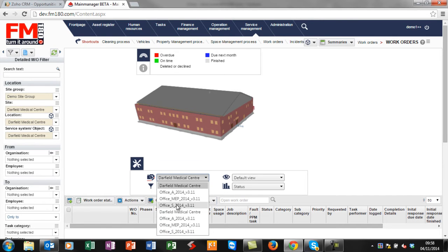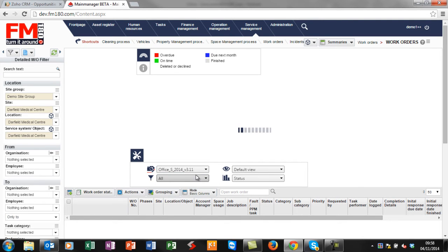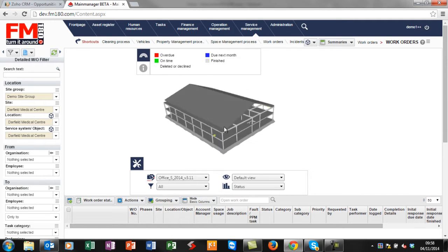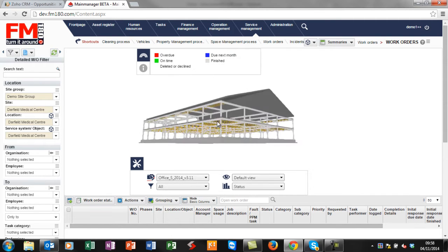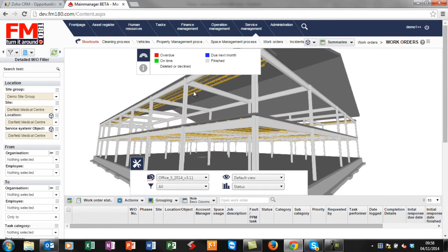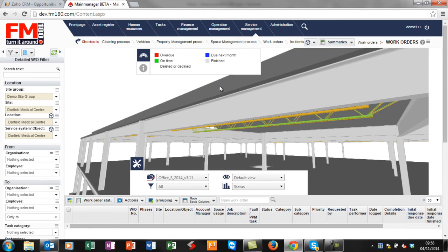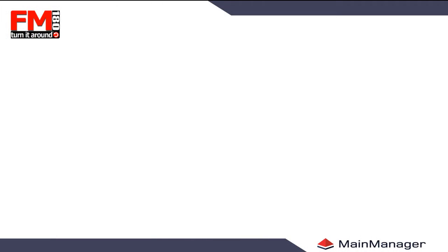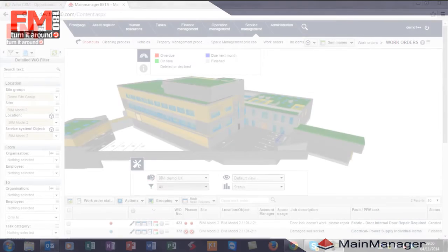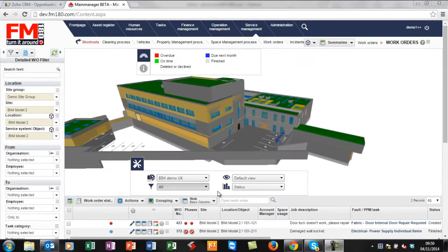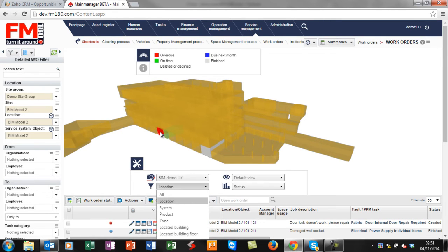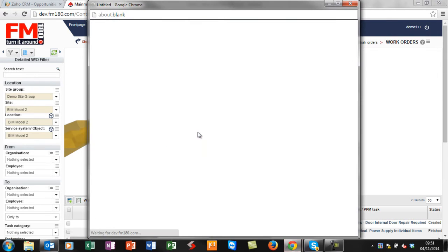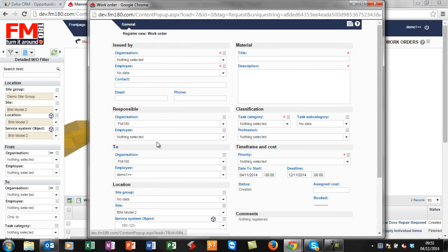This gives the construction team the ability to manage snagging on the same system that the building operators will eventually use. The history of the building can now start during construction rather than 12 to 18 months after completion, as is common at present. The BIM elements will enable quick and accurate reporting of faults to building fabric, or to report incidents of problems at the space level. This ensures a valid audit trail for any and all activities on site.